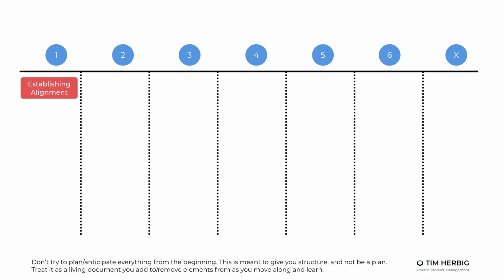What you should keep in mind when scheduling activities though is dependencies to other teams and the necessary lead time it might take to get those things going. A couple of examples. When you want to create cross-functional alignment, not just with your team, but also with other business units or maybe even the C-level, this probably takes some time to get a meeting into their diaries. Meaning you want to schedule an alignment session where you can work through a collaborative alignment framework as quickly as possible, because that should serve as the starting point for your discovery efforts. So start with those activities which have the longest lead time to actually get going.